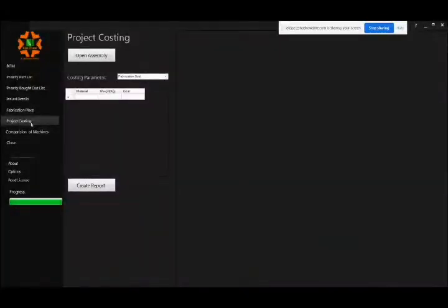Project costing, one of my favorite features. So now, for identifying a budget, for releasing a quick quote, say we get an inquiry for a machine, and we need to release a quick quote to the customer or the prospect. Any project does have five major components. Those are material, labor, engineering, packing, and transportation, right? So these five major factors drive the complete project cost. So what we have tried to do here is to cover those things.